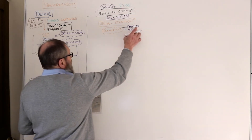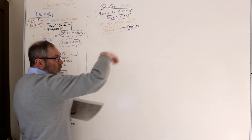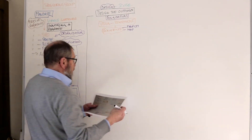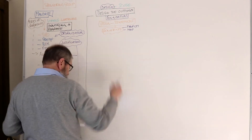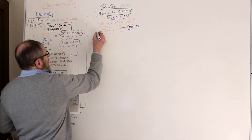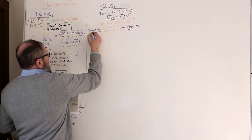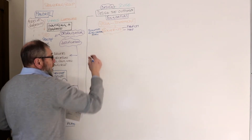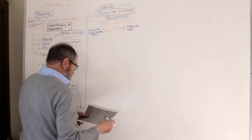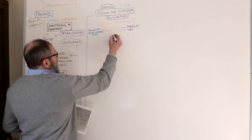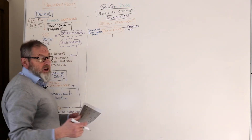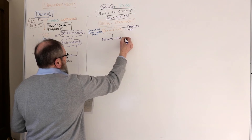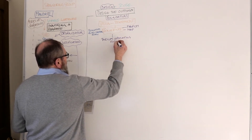You have the benefits profile, which defines each benefit, the owner, how we're going to measure the benefits, and when they'll be measured. So we can put that into the plan, and therefore have a benefits realization plan, which will be part of the programme plan documentation. From that, we have the target operating model, which explains and defines how the new environment will look.